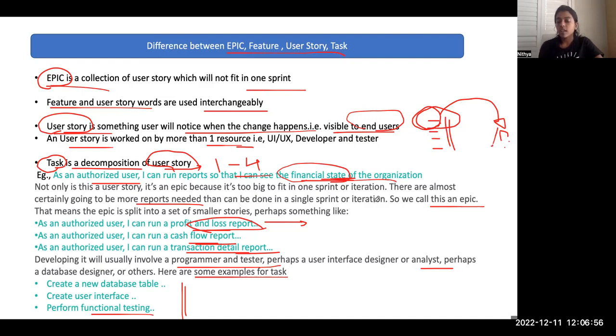So here is the key. If your PMP question asks, can the sprint length be changed? The answer is definitely no. So the sprint length always remains intact. And you estimate the user story at the product backlog and you estimate the tasks at the sprint planning meeting.